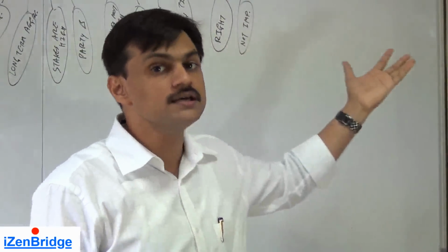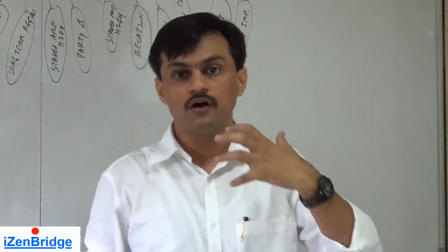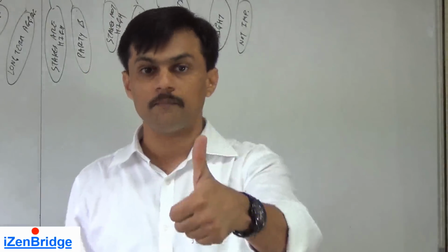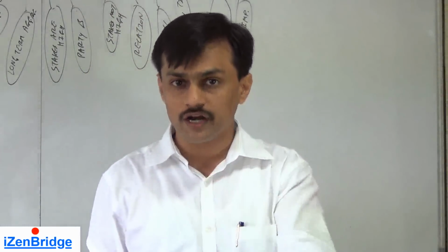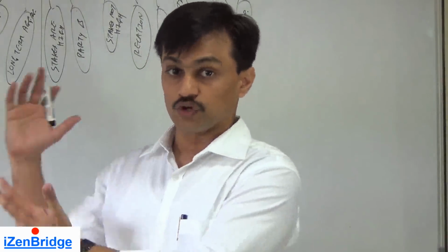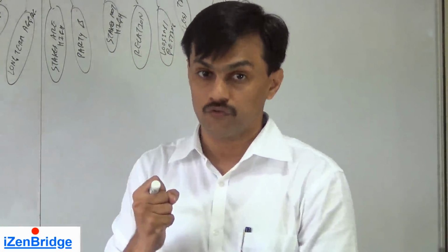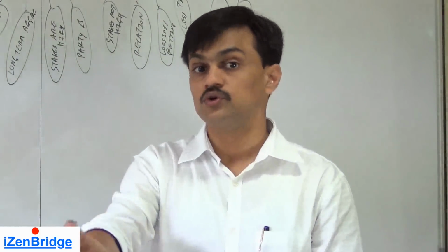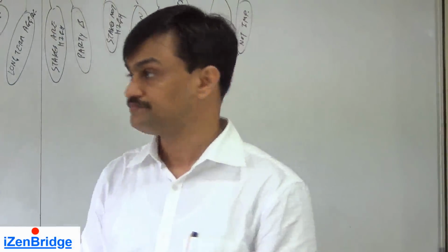So forcing is another way of resolving conflicts, where a powerful person, a person who has authority, takes the decision and then the other party has to follow it. Forcing can only be applied by the powerful person on the person who is not that powerful or that influential.